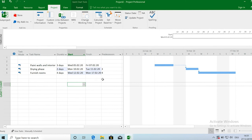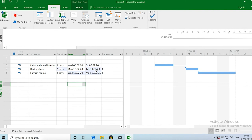Now the benefit is really that Microsoft project plans out your entire project completely automatically from start to finish with the goal of having a minimum project duration. And you can also enter like more constraints for example you can upload your company calendar or you can upload the bank holidays in your country. And Microsoft project will automatically consider those days off and plan your project around those holidays.